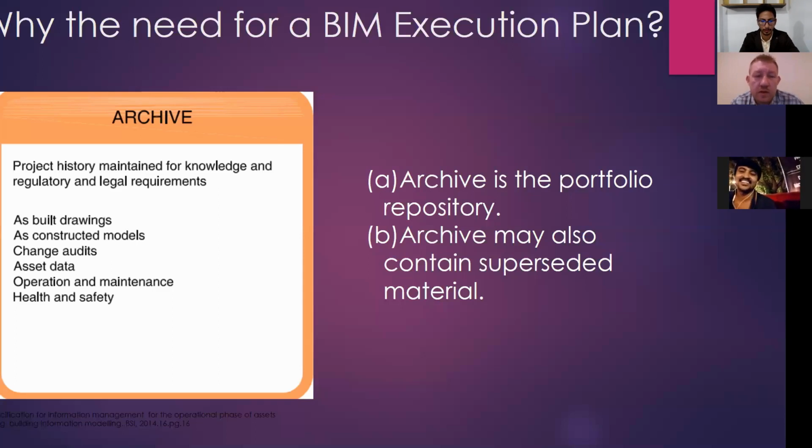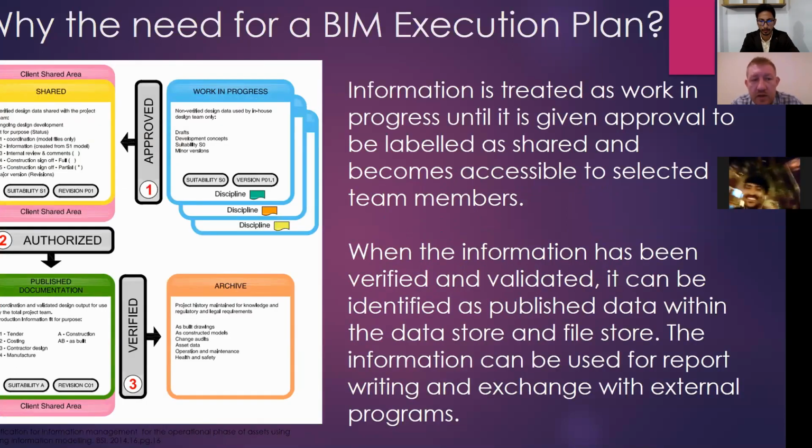So keep in mind that this will be the process that the information will go through, and this will be the basis of a BIM execution plan. So what is going to be considered work in progress, what is going to be considered as shared information, published documentation, and archive. These are the steps that the actual BIM execution plan will go through as well.